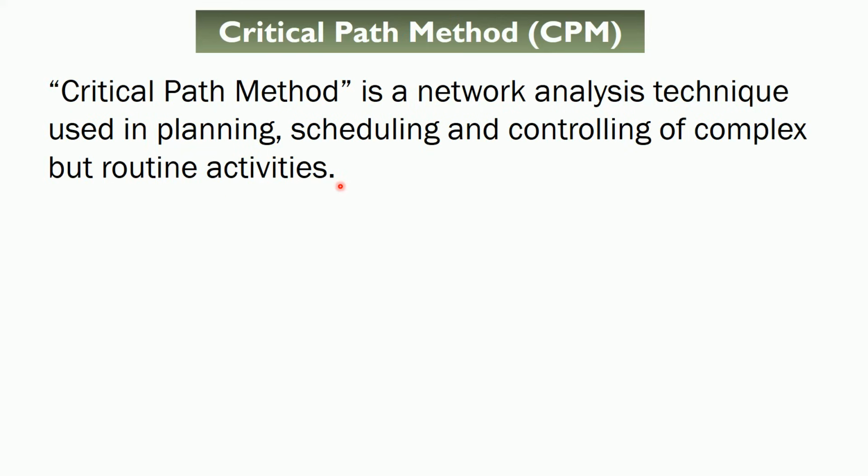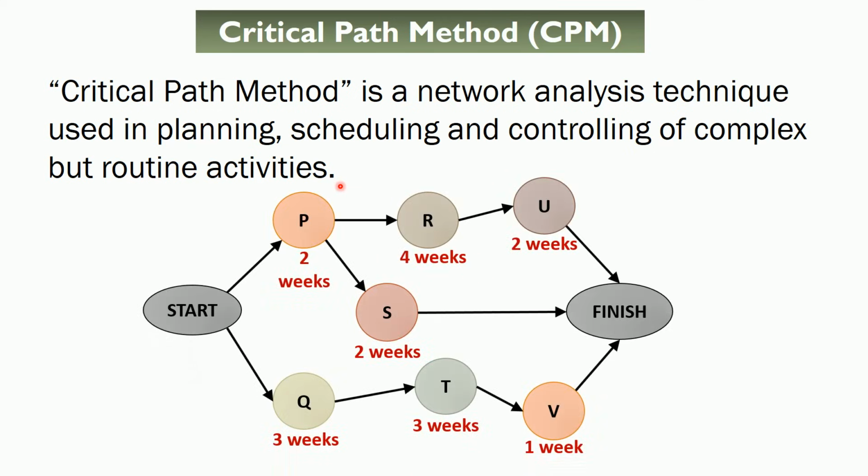For this purpose, first of all, we need to identify the critical and non-critical activities on the basis of their importance to avoid chaos, queue generation and also reduce their time. Once all the critical activities are identified, a network is drawn. This network connects all the crucial activities and shows which activity is to be carried out first so that the sequent activities can be performed successfully.